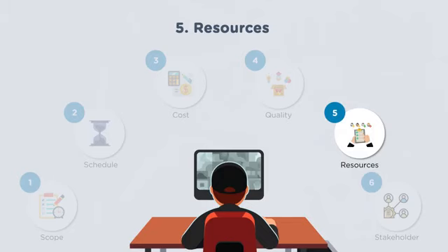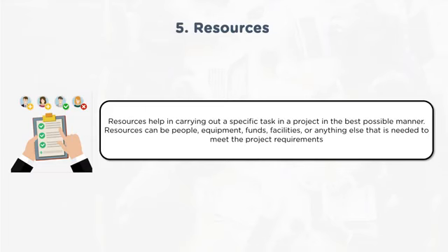Resources. Now, as I mentioned earlier, every project needs resources. It may be human resources, it may be technology resources, it may be any other resources which are required to do the project. So the organization acquires resources, configures and then deploys them. For example, in a project, you acquire a server, you configure a server, you deploy a server. That is a technology resource. A human resource is onboarded, recruited, and given project induction. At the same time, the skills and capabilities of individuals need to be ensured according to the requirement of the project.